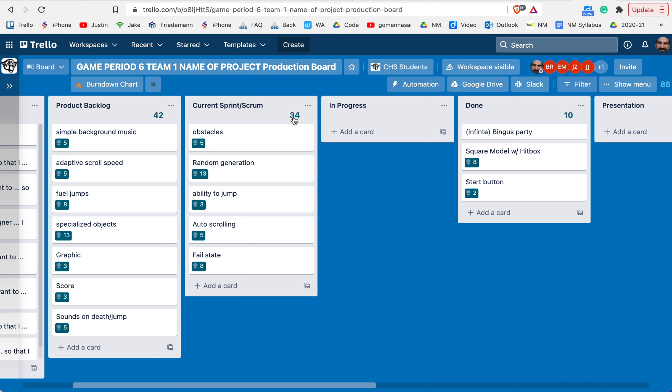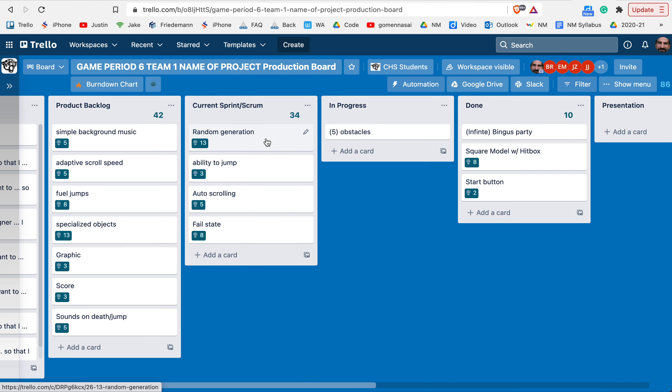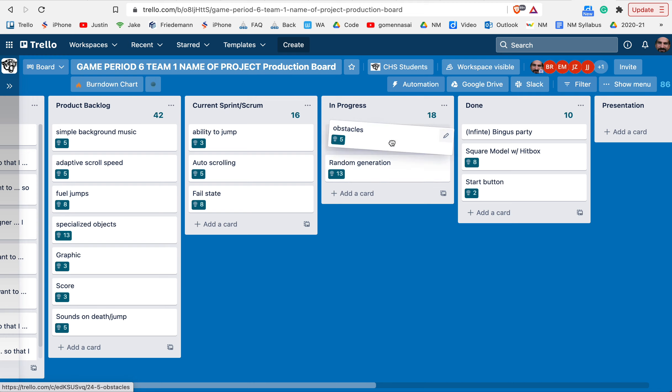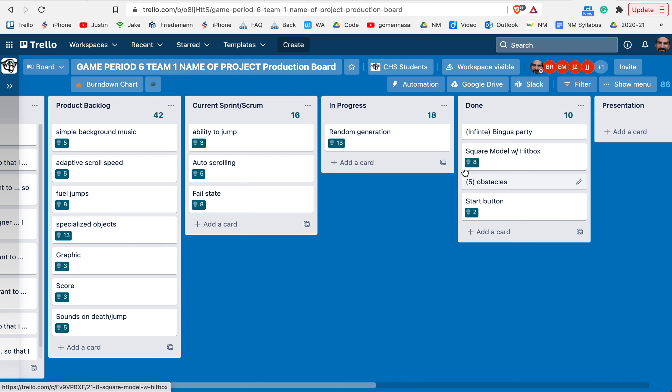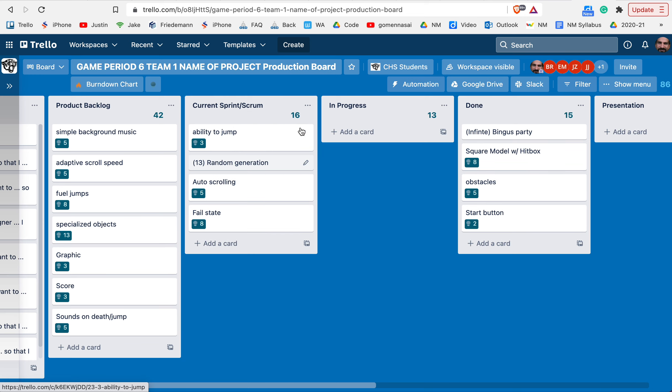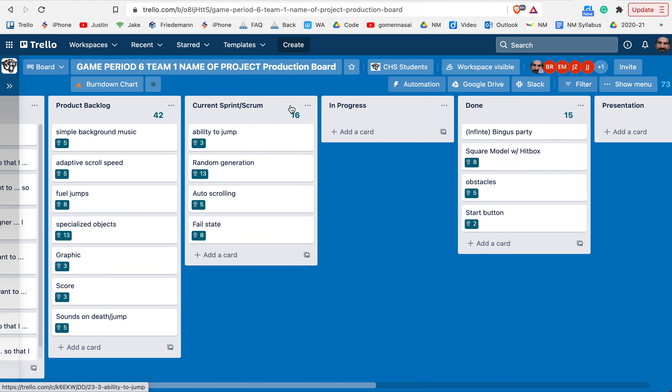So we started off with 44, now today at the top of our column on the burndown chart would be 34. You decide to work on these things, the team starts working, come back the next day and you're like, well we got this done. That would mean our burndown chart would now be 29.